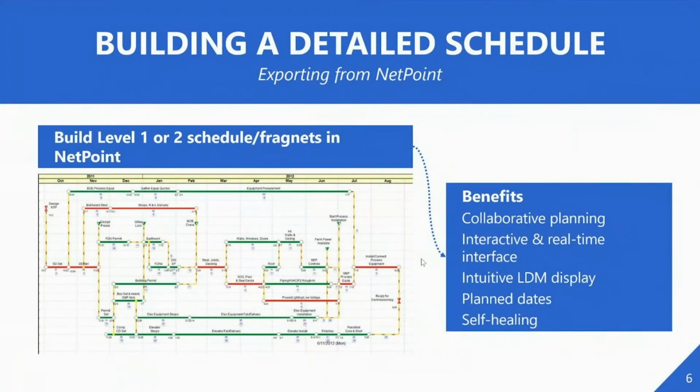Okay, moving on. So now we will go into some of the scenarios which are commonly used in P6 NetPoint transfer. One potential approach is trying to build a detailed schedule in P6. To do so, you could build your work fragments or level 1 and level 2 schedules in NetPoint and then transfer that information into P6, where you thereafter add more detail to the schedule.